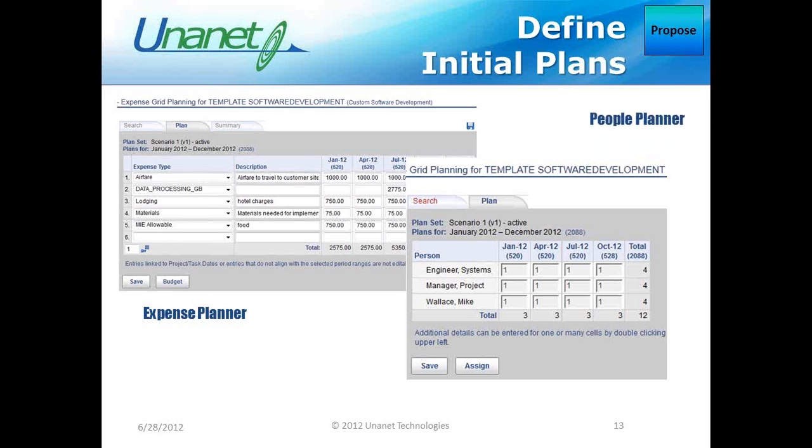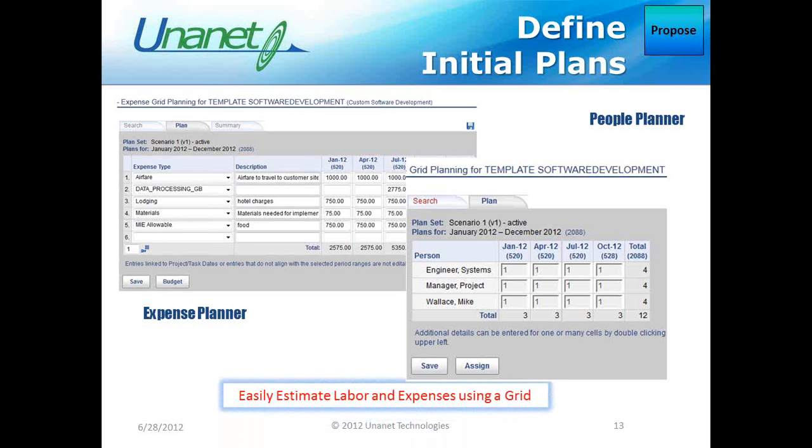I can plan for specific people with defined labor categories or unnamed people, or even a skill set that the project requires, or maybe a specific location that I prefer. I can add certain resources at half-time or quarter-time, or plan just a specific number of hours based on the knowledge I have now that I've worked successfully on the previous project.